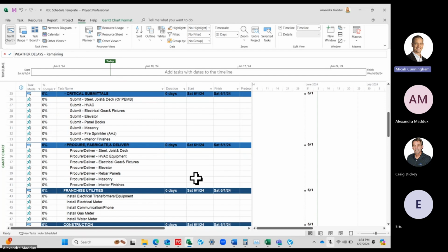But then you would add your contingency at the end, once you're done with the update, just add 2 more days to it. And usually I like to have a few long activities that you overlap and change the overlap, because they'll catch it if you change the duration. It's kind of sneaky, but I'm not recommending that, but that's sometimes what I do.